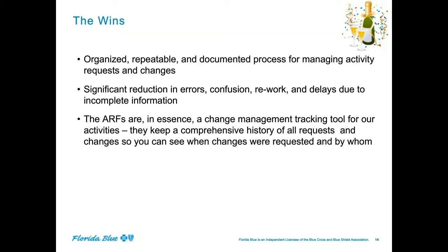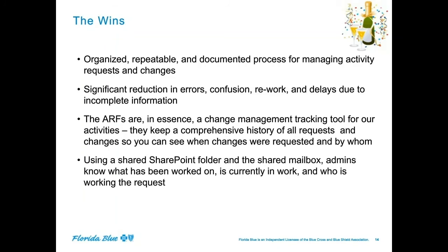The ARFs are, in essence, a change management tracking tool for our activities. They keep a comprehensive history of all requests and changes so you can see when changes were requested and by whom. Using the shared SharePoint folder and the shared mailbox, admins know what has been worked on, is currently in work, and who is currently working the request. So if there are questions, I can go ask one of my other admins about it. If somebody sends me an IM about something that I'm not working on, I can go find out who is and ask them about it.